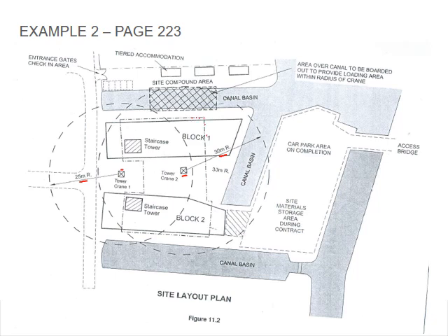So you will have at one stage where you close, we've done everything around the crane, and then you need to take down that crane and then fill that section up later on. Once you're out of the ground, you can actually take that one out or get rid of that one and only leave the one. So you guys can read through that.